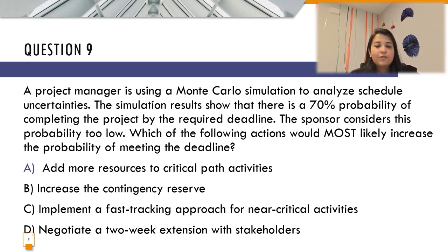Coming to option B, to increase the contingency reserve. Increasing the contingency reserve is going to add more buffer to the project, but it's not going to solve the current situation given over here. So that's not the right choice either.